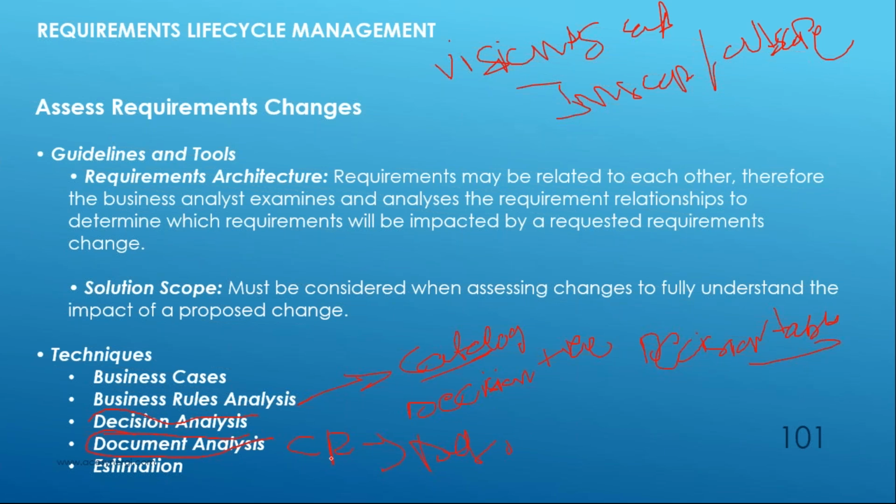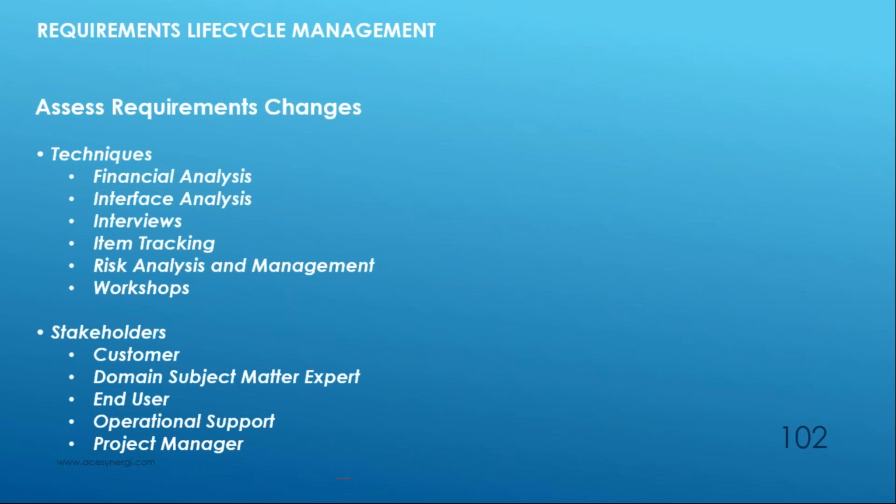Document analysis, definitely, in order to understand how the current business processes are running and how the new changes may impact the current business processes. Estimation is also one more technique. You have to come up with the cost aspect of how much the change is going to cost, and you also need to estimate your timelines to incorporate those changes. In such a context, your estimation comes into the picture.